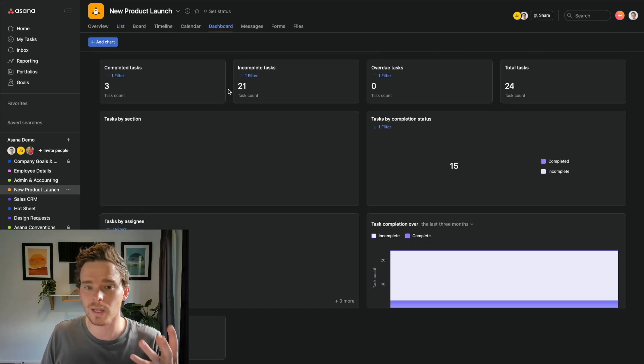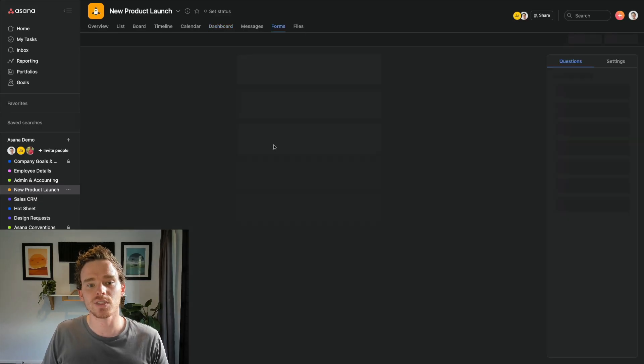If you're going to use the dashboard for reporting and forms for submitting information into the project, you should set it up as an actual project to get all these different features Asana offers. However, if you don't need all these features and your project is quite small in scope — not that many tasks, a shorter timeline, maybe a couple of weeks or a month rather than three to six months — then possibly you don't have to set up a whole project in Asana.